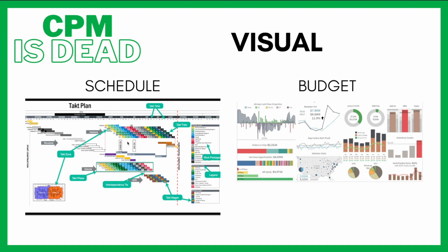Now, all of these different things might mean something or another, but this one-page graphic that I call a takt plan usually helps us to see way more information. What things correlate from the exteriors to the interiors? Well, maybe the glazing has to be done or something else to dry in the building so that we can start drywall or the interior finishes.